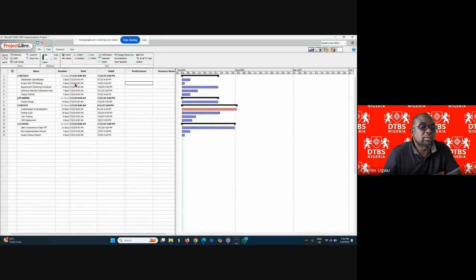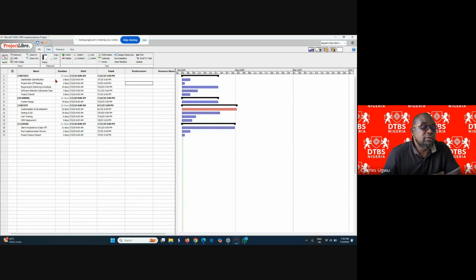You see the system automatically adds the date for you. For instance, you say 3 days, let's say 2 days. The system will automatically add the date for you. You don't need to start putting dates. Are you getting my point?